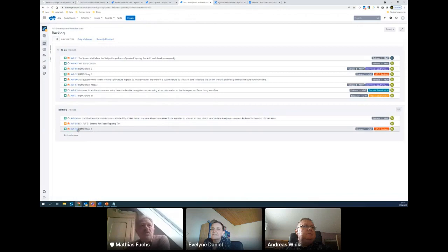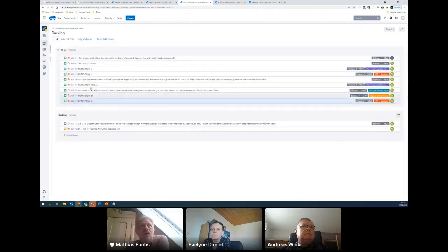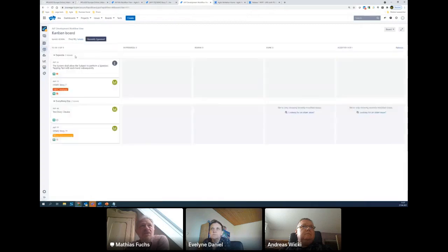Okay, and now you see, this wasn't there before. Now it appears in the backlog of the developers. And again, as a PO or product manager, I do have the possibility to reprioritize the story. And if it's important, I would just put it in the to-do list of the developers, which results in the fact that I see the story here. So the same thing happens again. The developers are looking on their Kanban board and see there's a new task to do, and would take this story for development. This is of course typically happening then in the sprint planning if you're using Scrum as an implementation methodology.